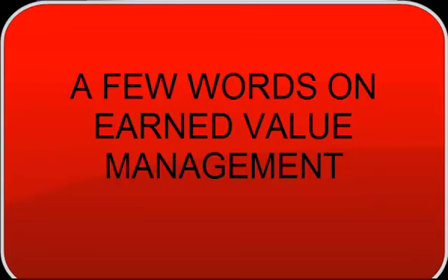Let me give you this very easy question. We're working on a project and we accomplish $5 worth of work. What's the earned value? The answer is $5. $5 worth of work means the earned value is 5. Another example, we're working on a project, we've spent 20 million and we've accomplished $5 million worth of work. What's the earned value? The answer is still 5 million.